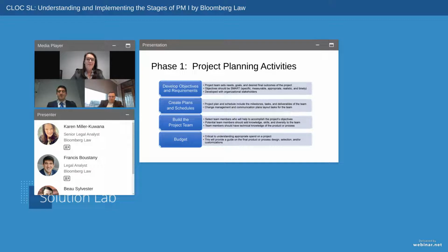During the planning phase, it is critical that you understand both the resources that you need and that you quantify and assign cost to these resources for the project or the matter. These resources can include labor, procurement costs, operating costs, costs related to the project deliverables, and other fixed and variable costs and expenses.